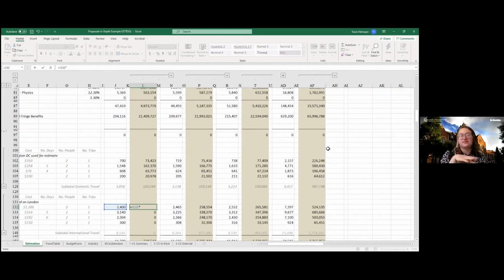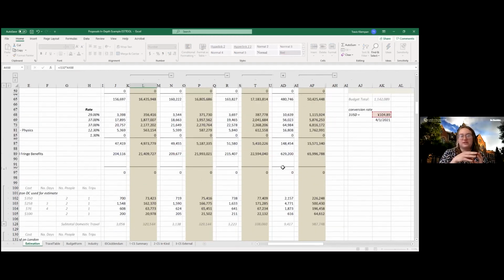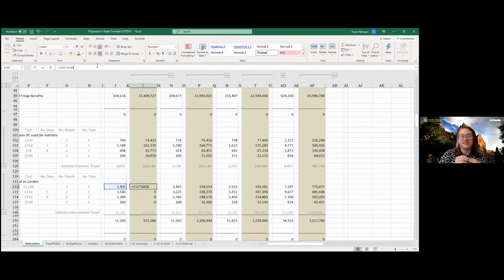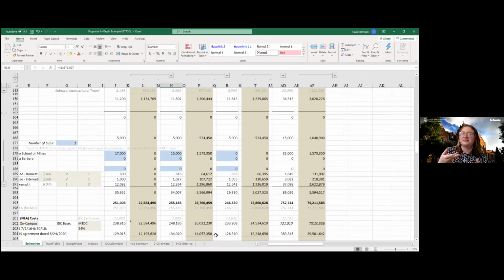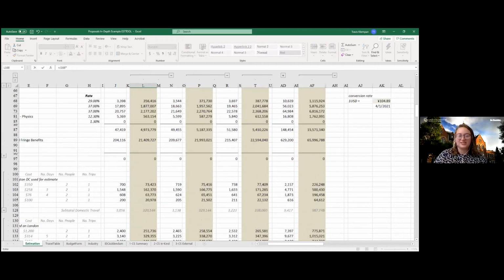So we include those $50 bank fees in other direct costs, and then the 15% is applied on top of that because the 15% is all of our direct costs and indirect costs together. So I guess it would be charged on the $50 bank fees. Does that clarify the question?